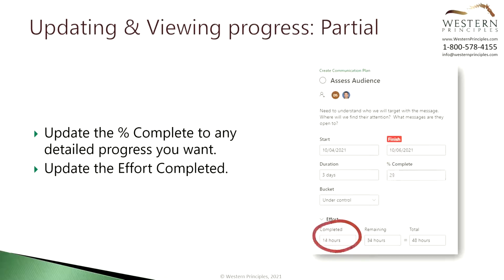If we update the effort completed, that will update the percent complete and remaining effort. We'll talk about changing the remaining and total effort in a moment. For now, don't touch those. Let's have a look at that in Microsoft Project for the Web.